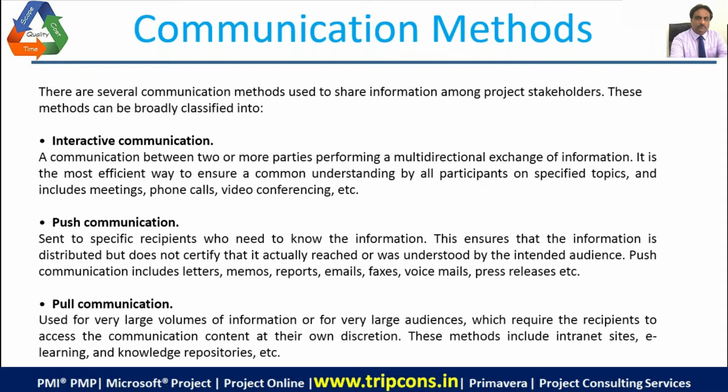And pull communication is when you have some sort of information which is addressed to or needed by a very specific group of stakeholders, or maybe a large audience. So the updated information can be kept in one place, and any stakeholder or recipient who needs the information can pull it down as per their requirement from time to time.